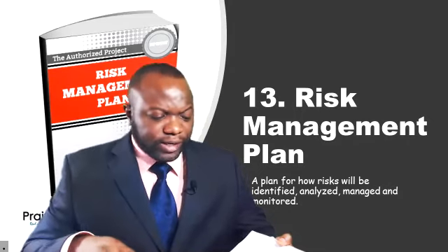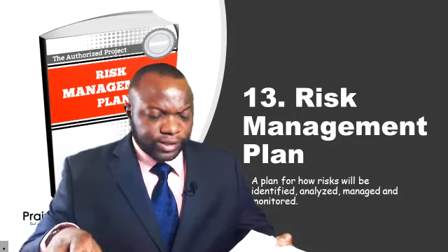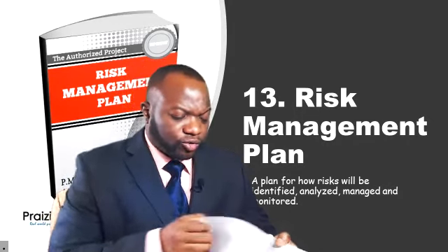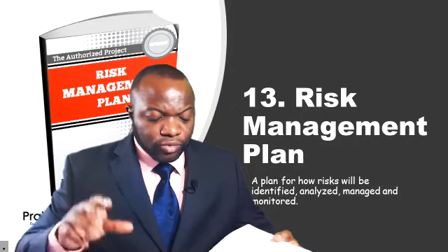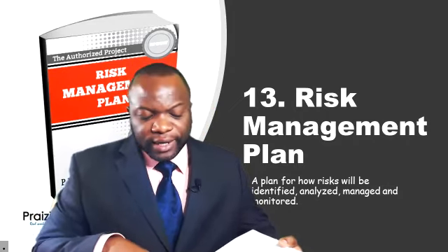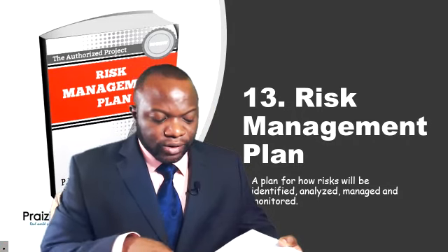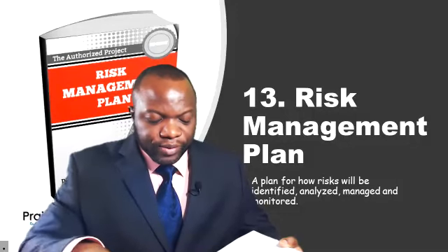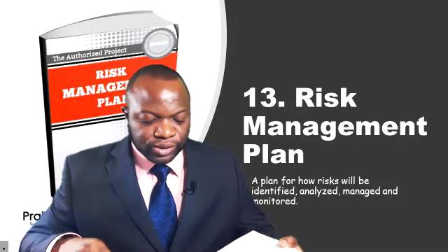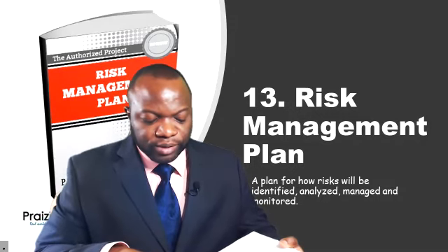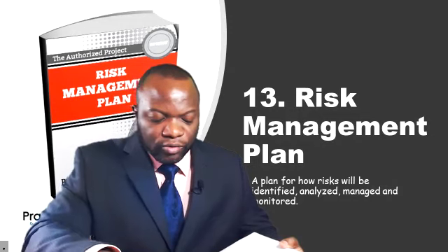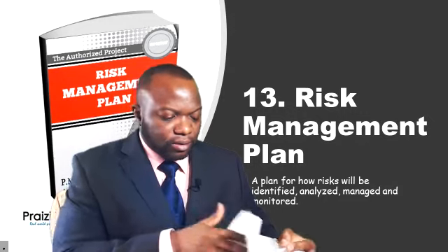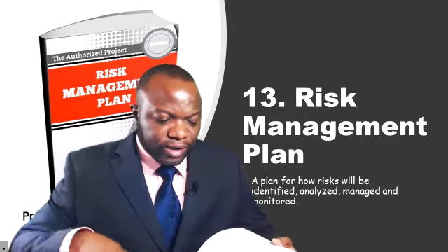Just like we have other breakdown structures, work breakdown structures, organizational breakdown structures, we also have a risk breakdown structure. The risk breakdown structure breaks down risks into categories. It states a common way to structure risk categories is with an RBS, which is a hierarchical representation of potential sources of risk. An RBS helps the project team consider the full range of sources from which individual project risks may arise. Let's turn the page over to 407.